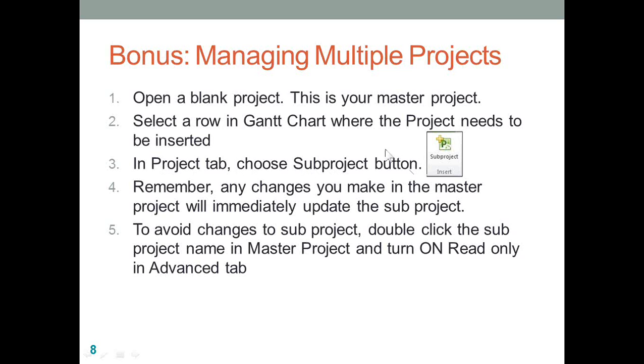I said that when you use this option, you can insert it in read-write or read-only mode. Remember, any changes you make to your master project will get automatically updated. This statement assumes that the inserted projects are not in read-only mode. And finally, to avoid changes to the sub-project, turn on the read-only option on your Advanced tab.